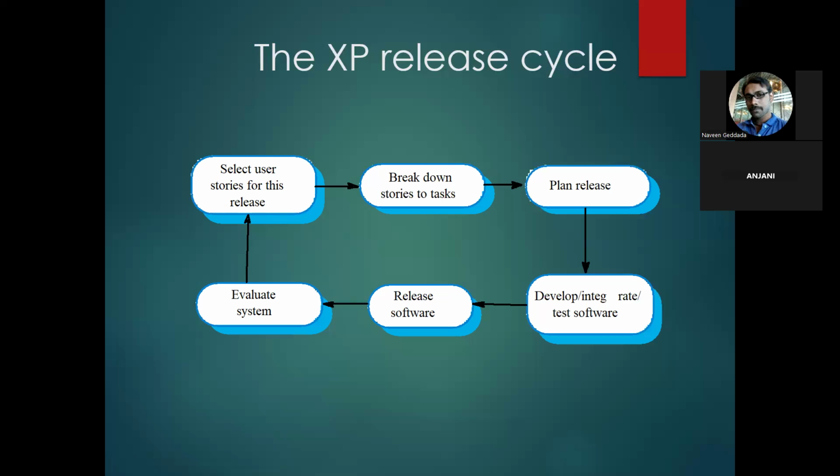In the product backlog, say in the last sprint the client has given three modifications to the login screen. So we will create the three change requests as three new user stories and put them into our product backlog. Now when the next sprint, sprint two, starts, we need to take these three user stories, which are the change requests given by the client in our earlier sprint demo. That is how the cycle will be repeating.